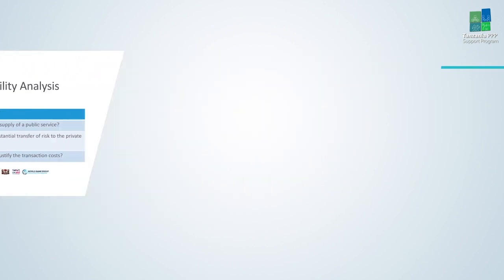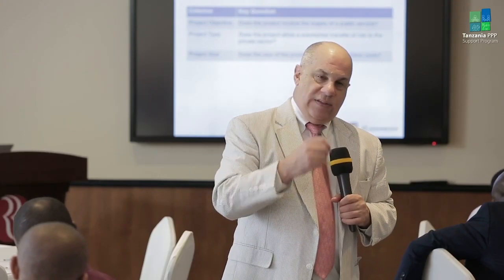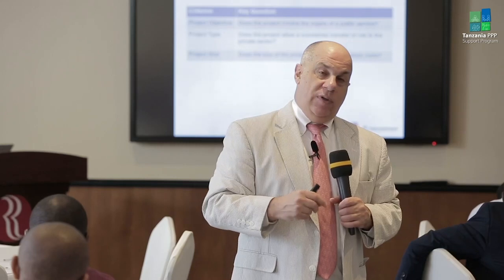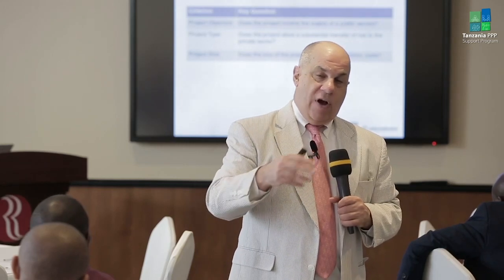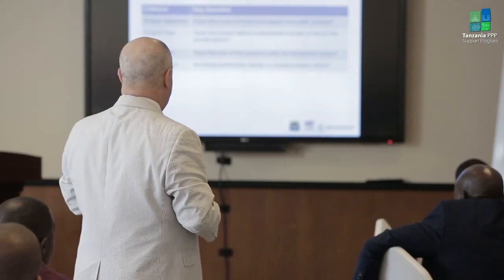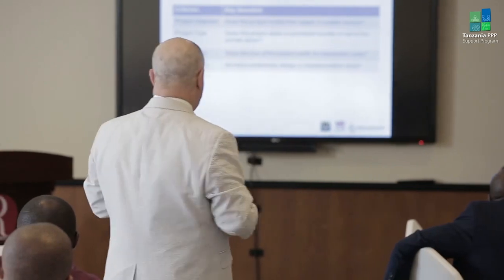So one of the things you want to consider is that it's sometimes difficult, not impossible, but it might not be cost effective to pursue a public-private partnership for a very small project. Basically, the squeeze might not be worth the juice. You might have to end up spending a lot of money for a rather small project. So generally, the larger the project, the better it is for a public-private partnership. It justifies the transaction costs.